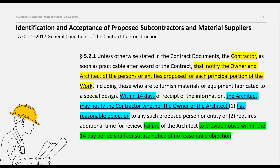It's important to remember there is no requirement for the owner and architect to affirmatively approve the proposed entities. Instead, if there is no rejection notice within the time period required, the proposed subcontractors and suppliers are deemed accepted.